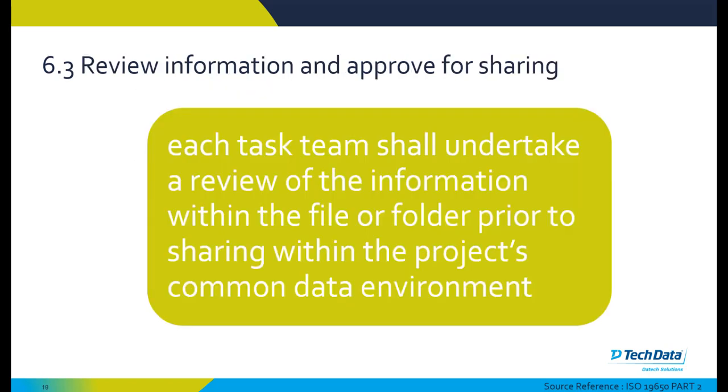Reviewing information and approving it for sharing: each task team shall undertake a review of the information within the file or folder before it's shared within the project's common data environment.